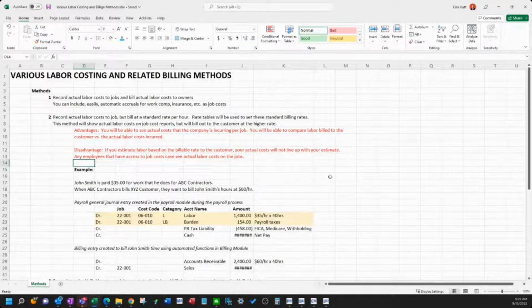And when you set up the contract in Sage so that you can bill this project, you will assign a rate table to that particular job. When you do that, you have to tell it, look at the title of my employees, and all carpenters are going to be given the $60 an hour labor rate to bill to the owner. Okay. So we'll just assume we're going off title for this guy.